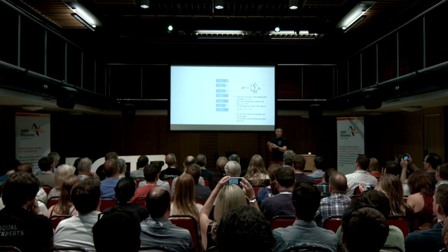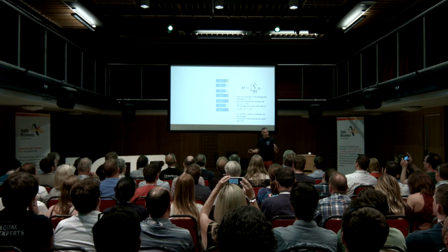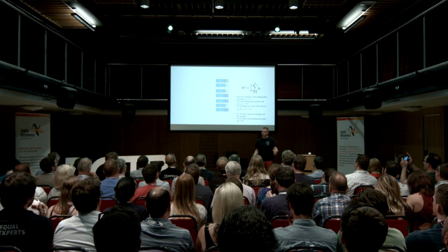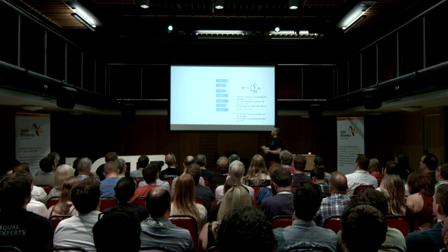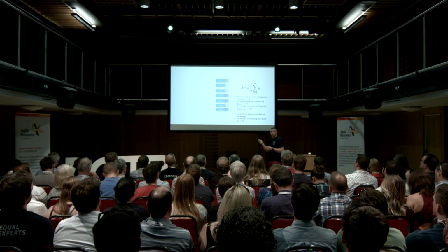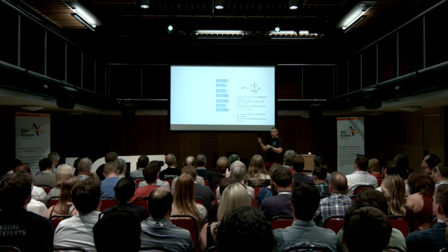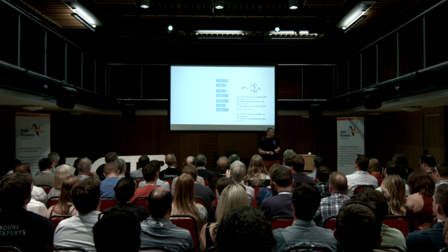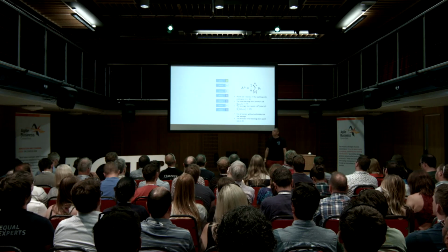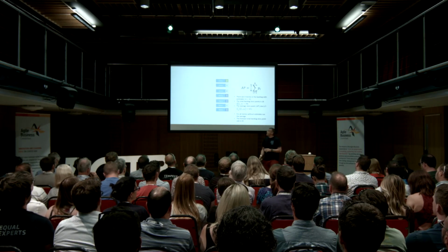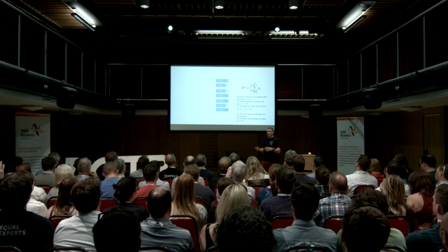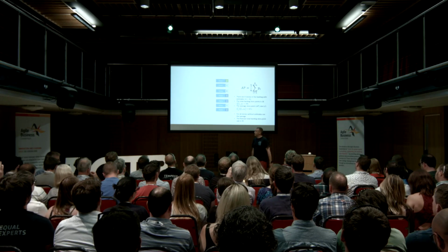Obviously, some of them are going to be bigger than that, some of them are going to be smaller, but on average, as a finger in the air, that's a good starting point. So now, say we had 18 points to start off with in our backlog, and now we're using that average, we can say, well, we're probably about 33 points. So this now starts to give you a bit better understanding of how big that backlog is.